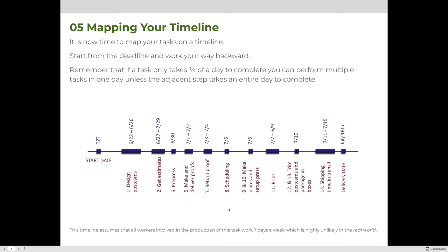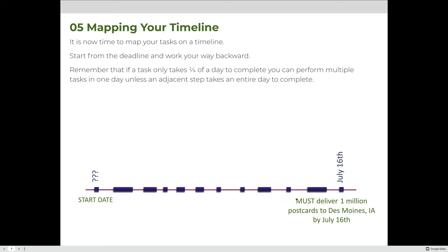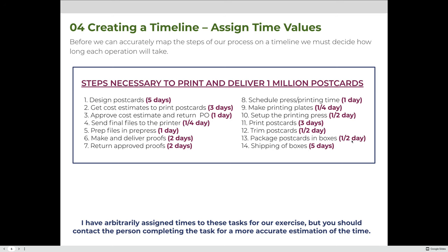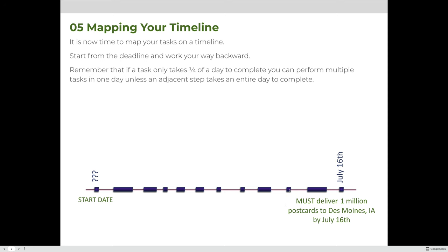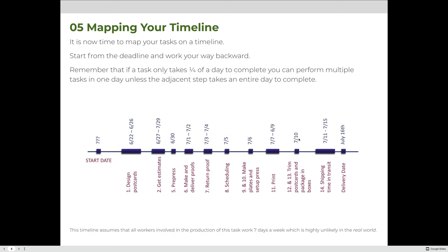Taking all 14 steps and working backwards: July 16th is the delivery date, so five days of shipping covers July 11th through 15th. Steps 12 and 13 each take half a day, so they can both be done on the 10th. Printing takes three days — July 7th, 8th, and 9th. Steps 9 and 10 are a quarter day and half day respectively; even though they don't fill a full day, July 6th will be dedicated to them with buffer room.